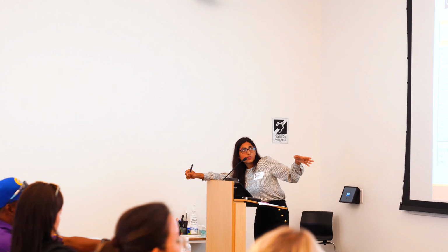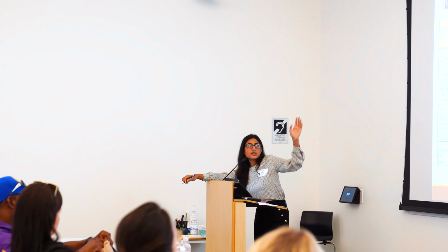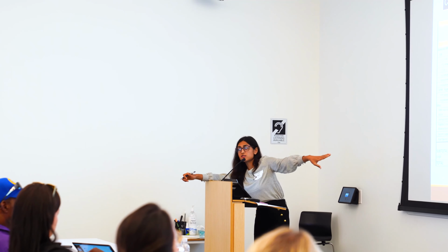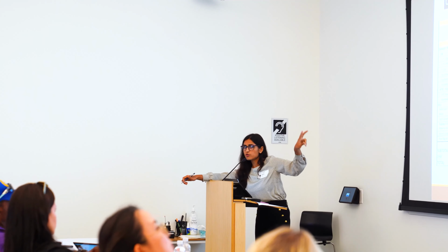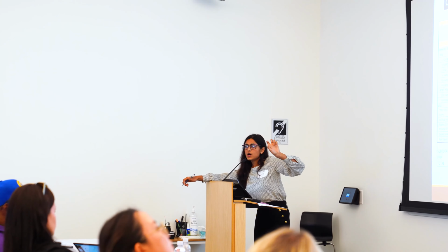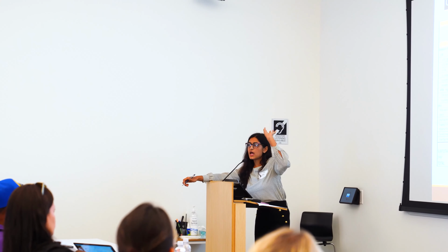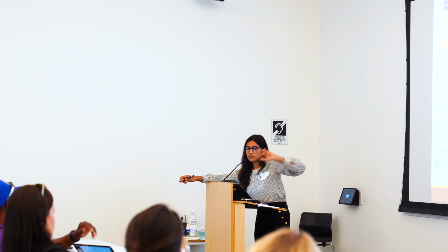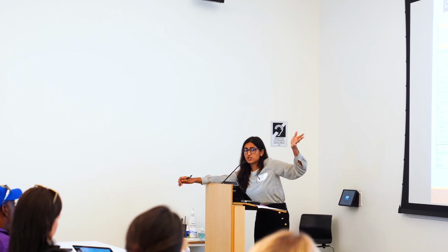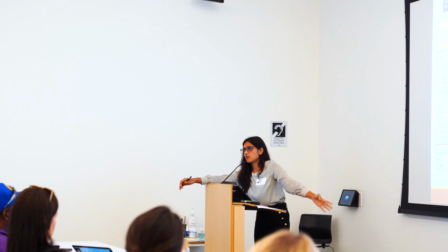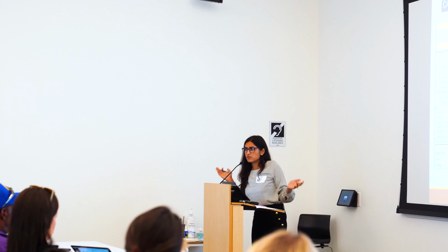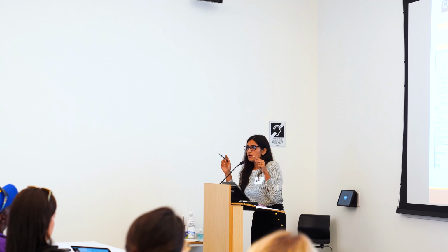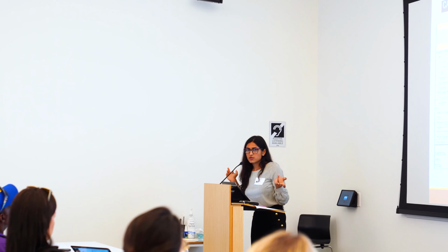So the way I am accounting for all of those factors is by playing with this difficulty factor. And mind you, this difficulty factor and the labor rate, both of those columns, I have linked to one cell at the top. There's a simple Excel formula to link everything to that one cell. So now if my next project changes, I'm not going about changing every single row, because I might have like 100 rows. I can't do that. So all I'm going to do is change it at that one cell, and my entire estimate changes.